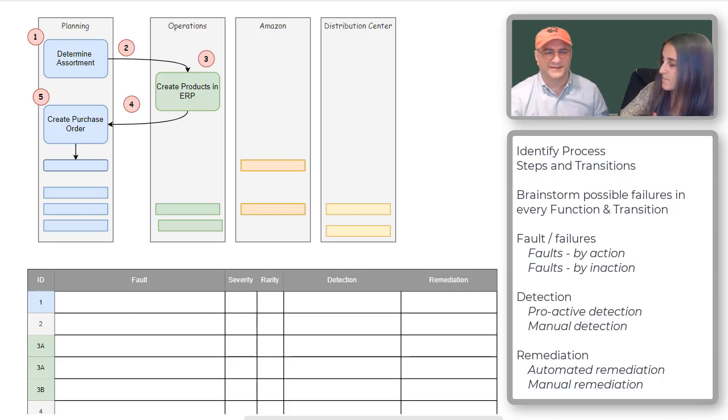Yep, the lead times would be too long, and then you would be behind, and you would not be able to hit your high-level revenue goals. So that would be a good reason to have a fallback strategy already laid out, right? Because otherwise you're going to miss it for a whole season, and then the next season you hope you remember.